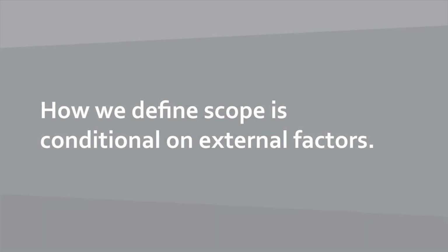Without properly defining scope of a project, your estimates become less accurate. You have larger ranges of costs and time, and it's a little bit more difficult to help share what will actually be done with clients, colleagues, and ultimately your end user.